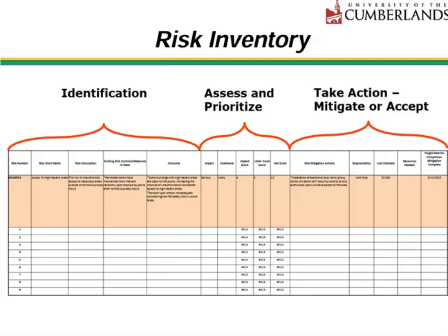Then we have the outcome column, which describes what would happen if the risk materialized despite our controls. This feeds into our impact assessment. Then we have our assessment columns, so impact and likelihood, each scored on a scale, typically 1 to 5. And these generate an impact score and likelihood score, which multiply together to produce the net score, or overall risk rating.